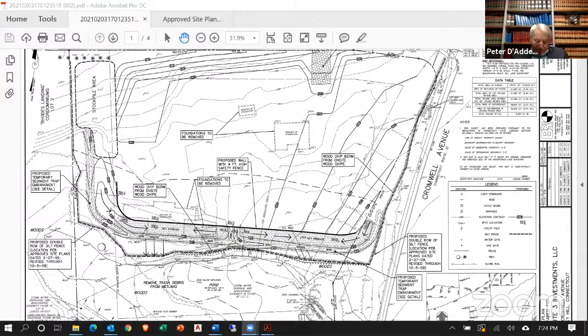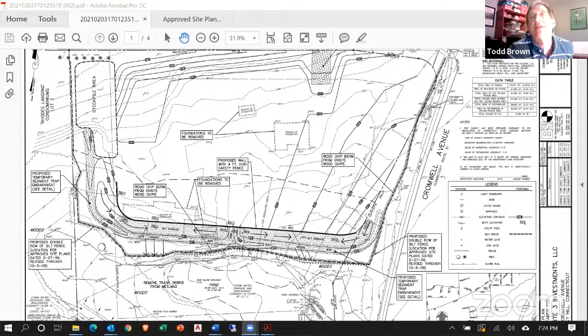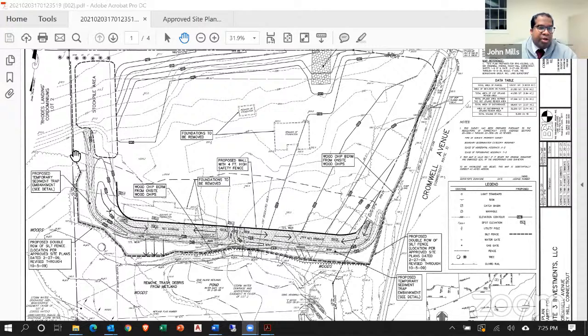Thank you. Mr. Alter, really quick question around that stockpile area, besides either seeding or covering in cocoa mats, hay bales, silt fence, anything like that to keep the erosion down? John, is that a silt fence around the bottom of it? That's correct. As you can see, the dotted line that we're highlighting here on our cursor will be silt fencing all the way along the property boundary to ensure that no silt or any traces encroaches upon the abutting property gradient of us. All right, thanks, John.